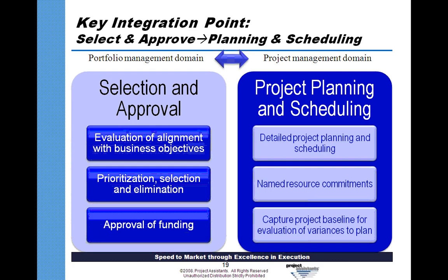As we have those thoughts, the question is, what do we need from the project management world? It's at this point in the process that any lack of integration of project management will be significantly highlighted. For example, if project management didn't develop the inputs to the business case, we might hear for the first time that a detailed project plan to execute this project is significantly out of line with what has been approved from a cost and schedule standpoint.